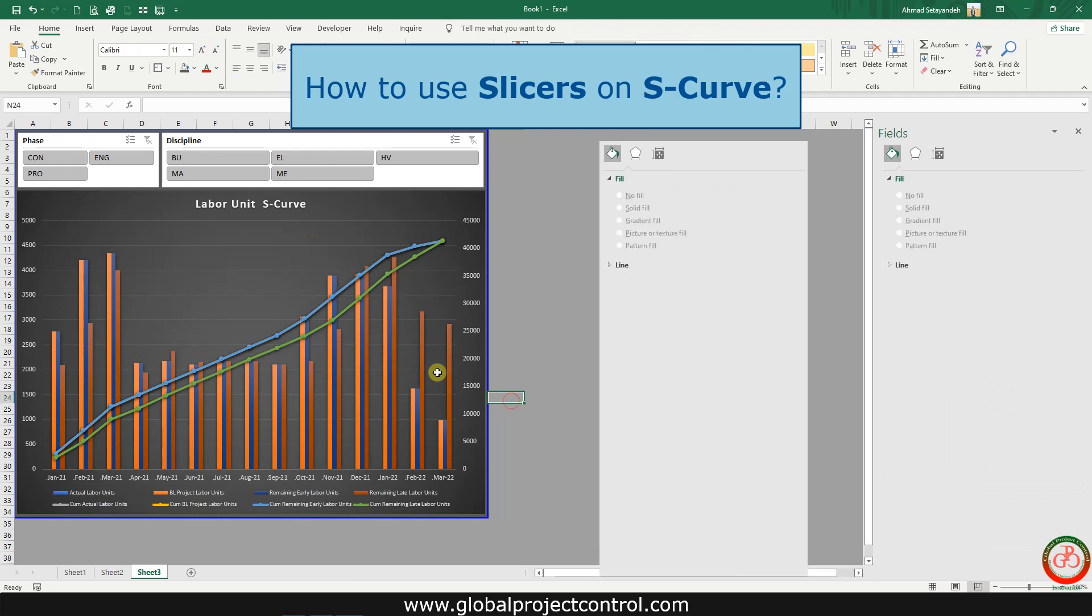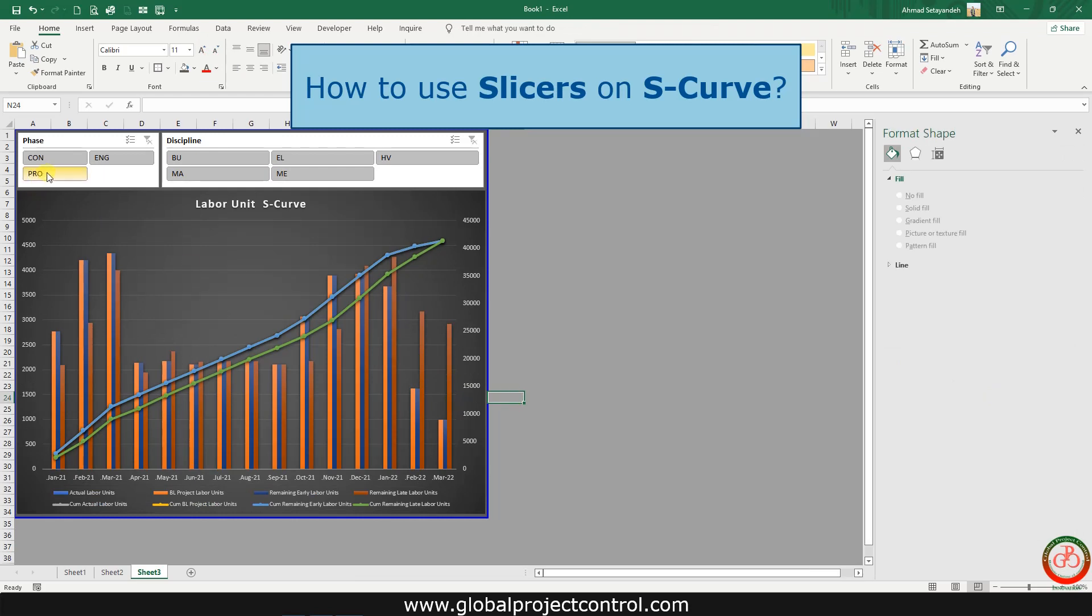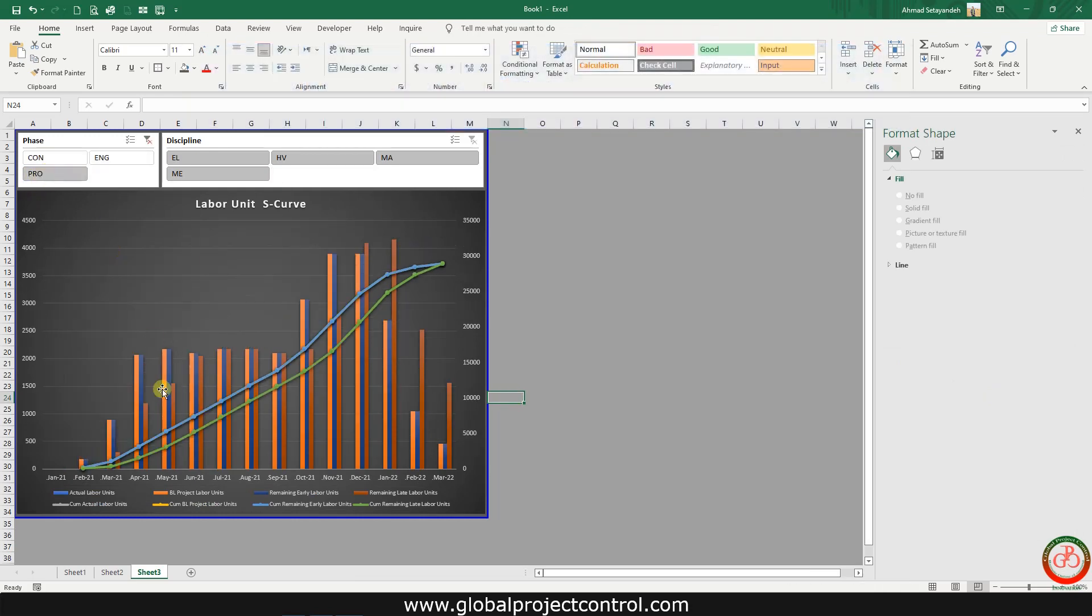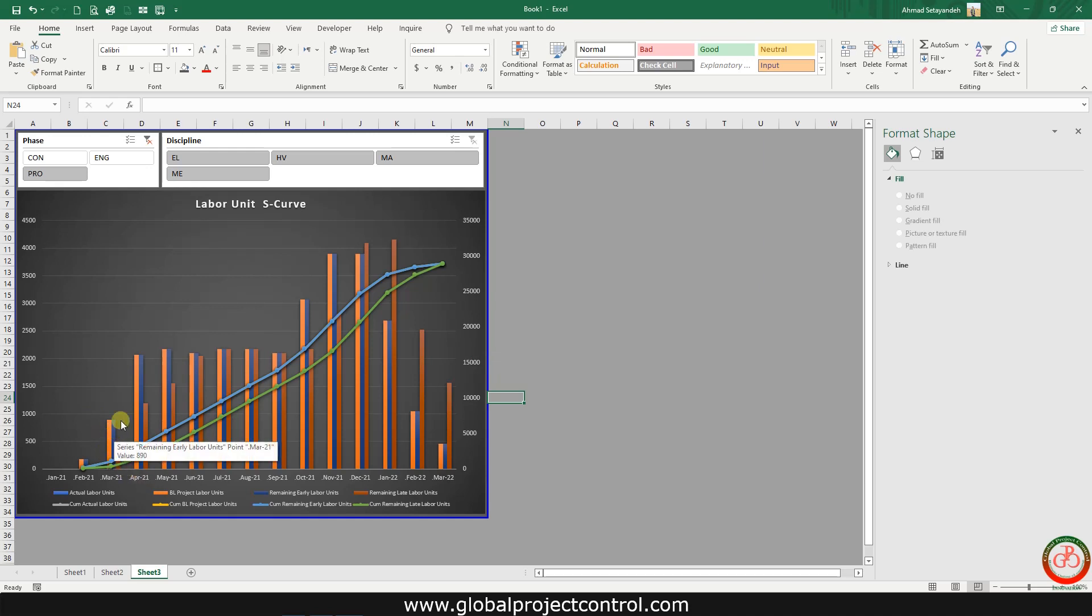Then if you select the procurement, data is reflected. This includes all information for the procurement: remaining early date and plan date.